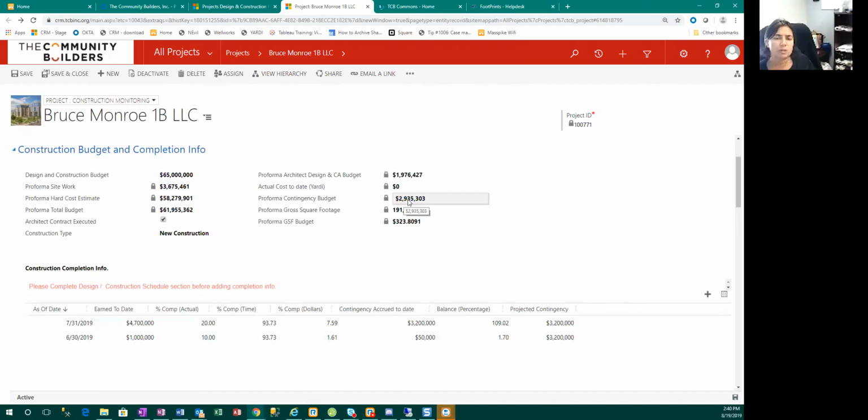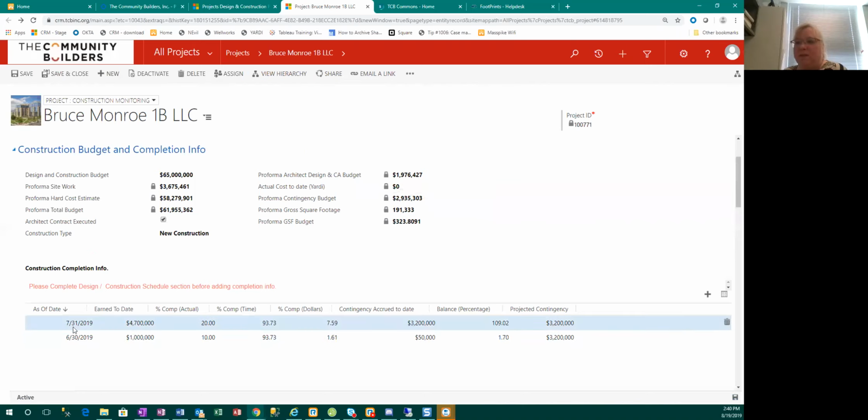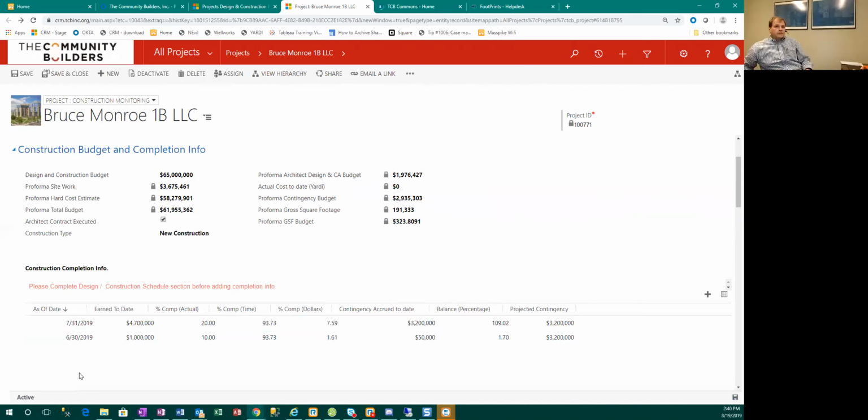I have a question about the earn to date. If we are paying the contractor from Yardi, there's a system. Shouldn't that be populated by the actual draw? So this number up here, actual cost to date, we are going to pull from Yardi. But this is more of a historical tracking, and it's real time. It's going to be ahead of Yardi because as soon as you get the draw, you're going to enter this data in. It'll take 60 days to hit Yardi. Right. Got it.